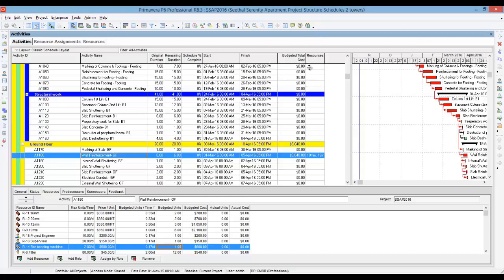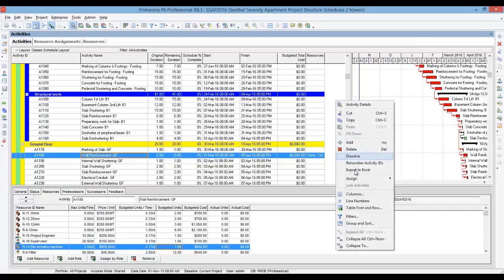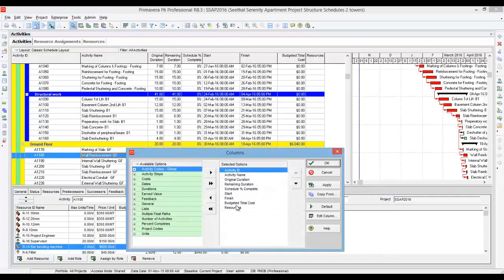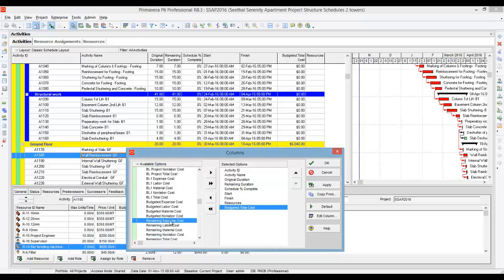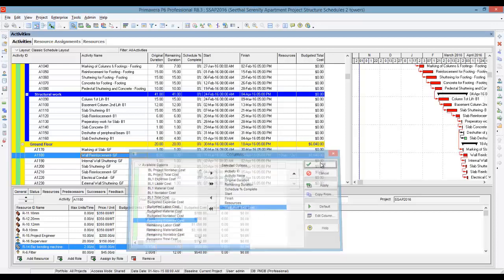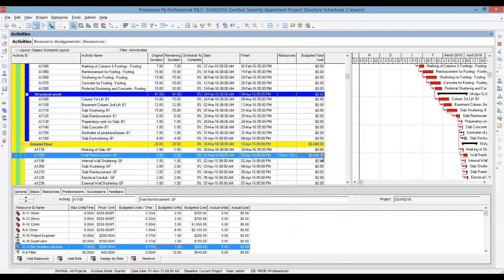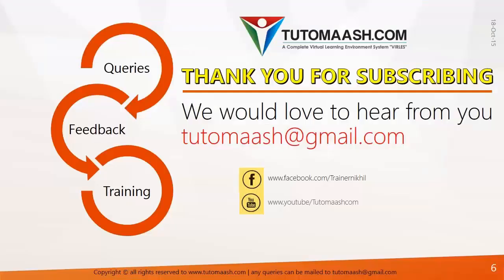After that, add a column for budgeted total cost by right-clicking and selecting column. Add budgeted total cost under cost, and press apply. Now you can see the program has arrived at the cost — that is $6,040 for the wall reinforcement activities. So this is how we assign the resource. Hope you understand how to create resources and assign resources. Thank you.